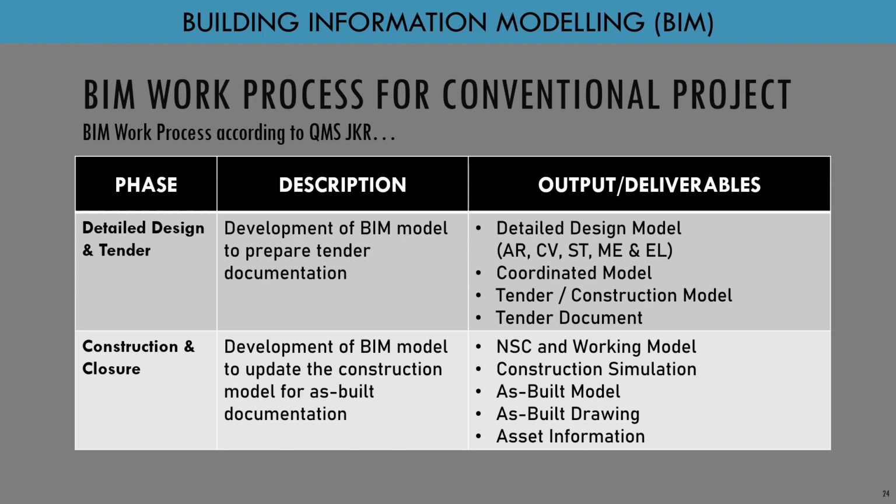Last but not least, for the construction enclosure, the NSC and the contractor must update the model. We call it the NSC or working model, and the contractor must develop a construction simulation, and they need to update it until the model becomes the as-built model. The drawings must be generated from the models, and all the information, especially the asset information, they need to build in or fill in the models.